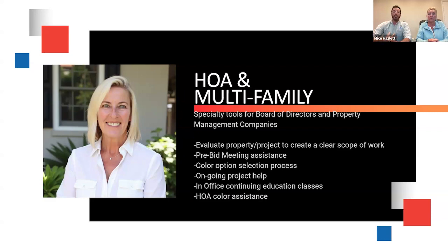I'm only qualified to get into paint and coatings. So I would hate to recommend a system and then it turns out that the beams are structurally compromised underneath. And take into account too, Mike and I are working on a property right now where we took the engineer's report and we encompassed it into our scope of work. So we had specific things that they found, their findings for structural, that we took, and then we made a product recommendation. So we kind of encapsulated everything together in our scope of work.